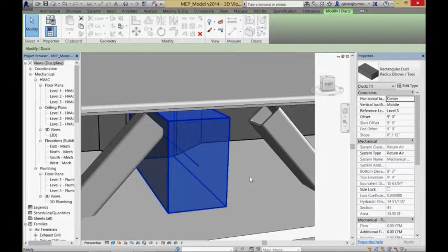You're really just trying to go through, figure out where the clashes are, try to isolate the clashes, just adapt as you need to, figure out whether you're going to change the structure or change the mechanical, and then once you make those changes, just rerun the clash test and see if you can bring that down. You may not be able to get rid of 100% of them, and that's okay. Get rid of most of them, something like that.